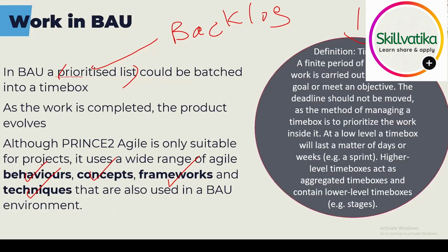A time box. A time box is a finite period of time when work is carried out to achieve a goal or meet an objective. The deadline should not be moved. Okay. That section there, you might want to highlight it. Let me read it again. The deadline should not be moved, as the method of managing a time box is to prioritize the work into it. Okay. So that entire sentence, I would highlight it because we need to explain what it means.